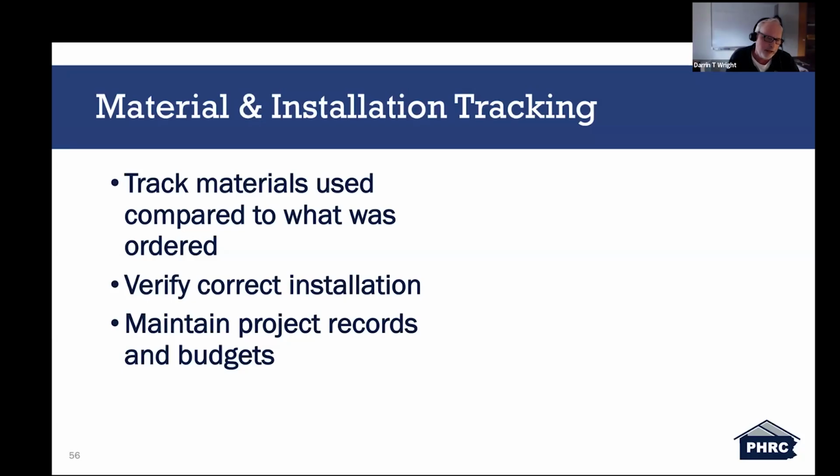So it can coordinate not only the cost of materials and what materials were delivered to the job site, but also whether there are a lot of materials left over, or if materials were misused, or not enough materials were ordered. It can help determine where the errors were made and correct that in the future as well.